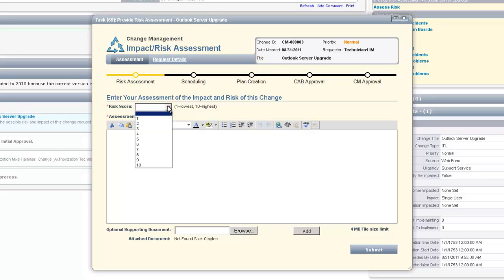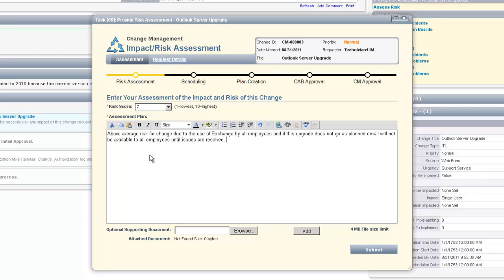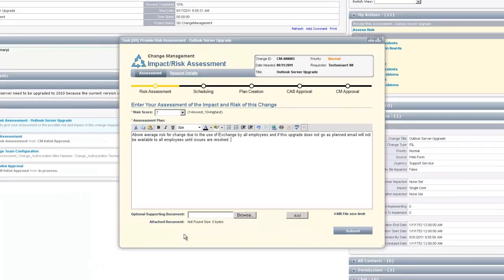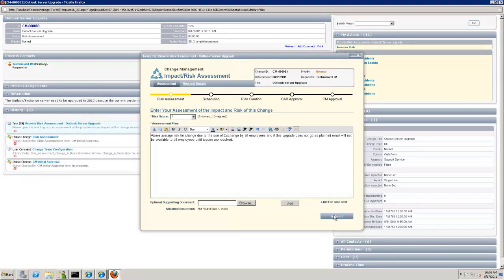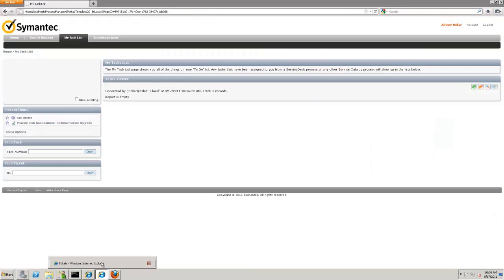Going up to Access Risk, we now have a risk score that we can set — one being the lowest, ten being the highest. We're going to choose a moderate-to-high risk score of about seven, and put in a reason why it has been assessed at that risk. The risk is a bit higher because it's going to affect a lot of people. Risk assessment will vary per environment and company, and they may create documents or plans for how to assess risk. Some customizations allow you to fill out a form during the risk assessment portion. We can also attach documents, and then submit.